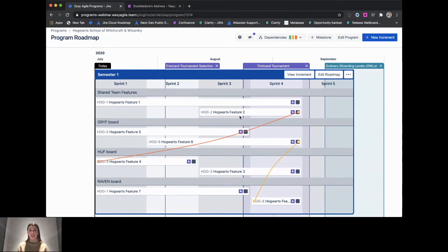And lastly, what you can see on your screen here is we're able to identify any dependencies that exist between features on our roadmap. I'm going to touch on what the colors of those lines mean a little bit later in the demo. But that brings us to PI planning agenda item number 1, which is setting of the business context. In a physical PI planning session, this might look like a business owner standing in front of a room of up to 150 members of the release train with a face-to-face communication style, going through a presentation, for example.